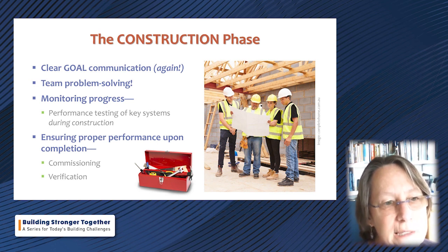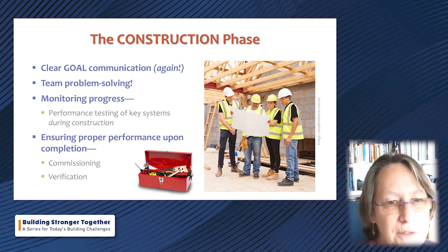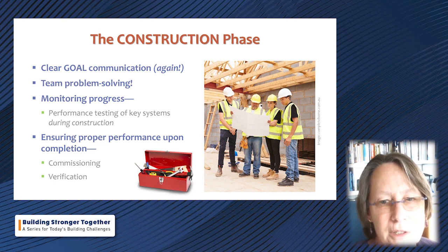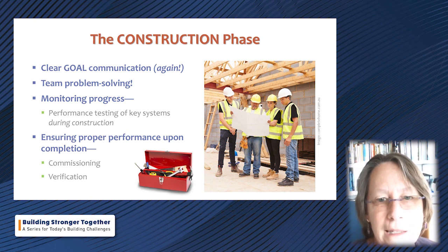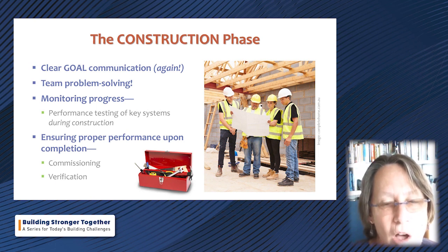I think this is another thing that I see when things tend to go south. It's often because somebody decides to solve a problem on their own without necessarily consulting those who were involved in the initial decision making that may have resulted in some shortfall or just a hitch. Maybe there's a supply issue or something. It's really important to take the time to go back to the folks who made the decisions and say, so we can't quite execute as intended. What are we going to do to resolve this? So very important. And then monitoring the progress along the way, and ensuring performance on completion.